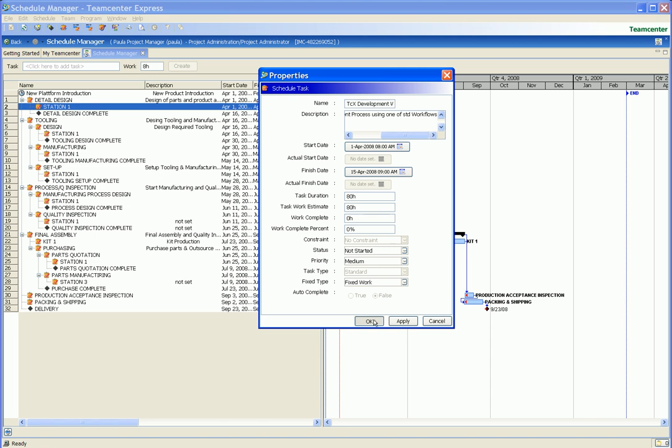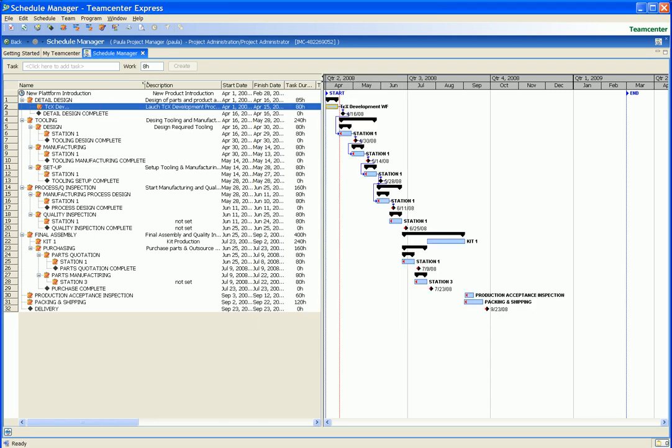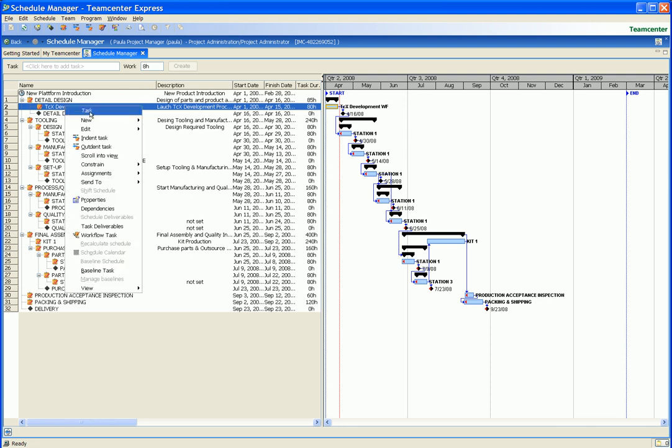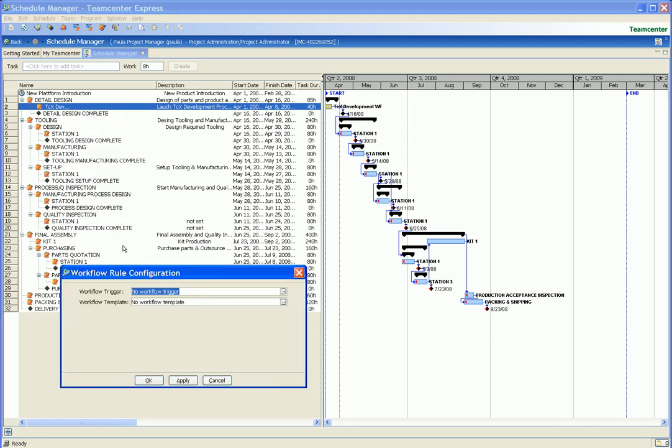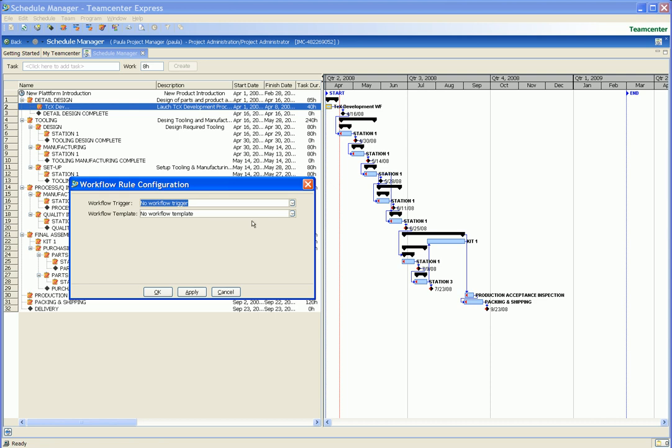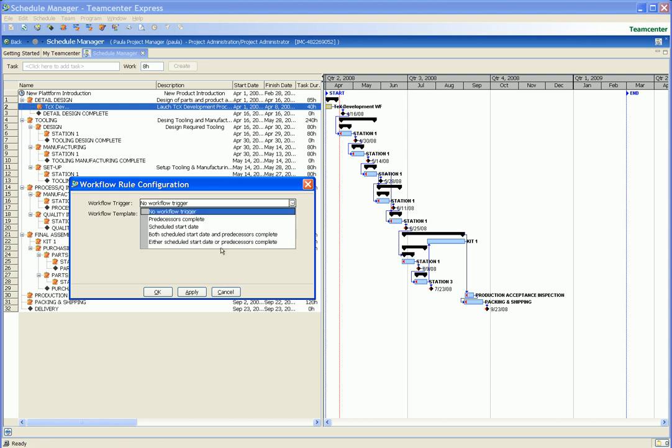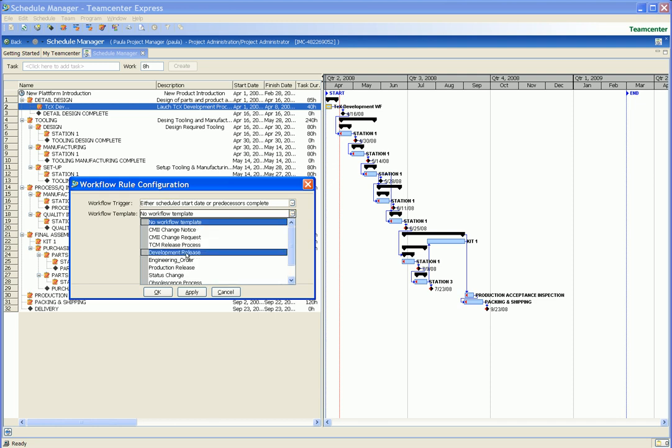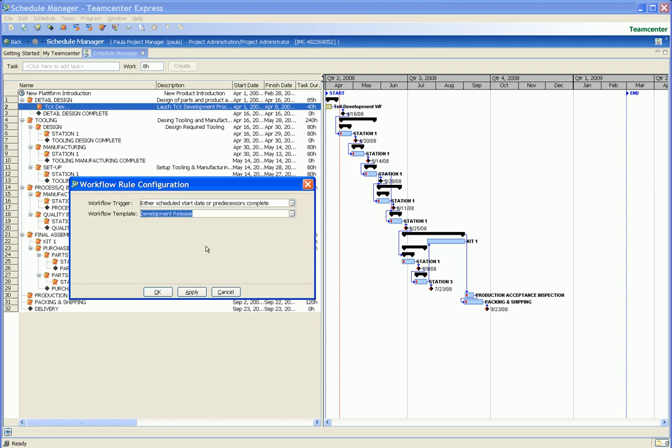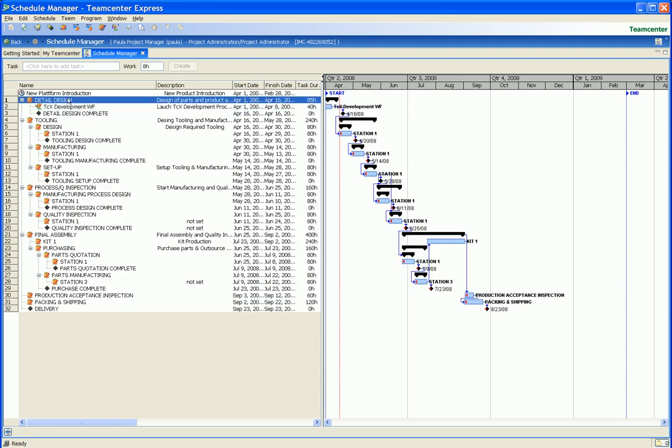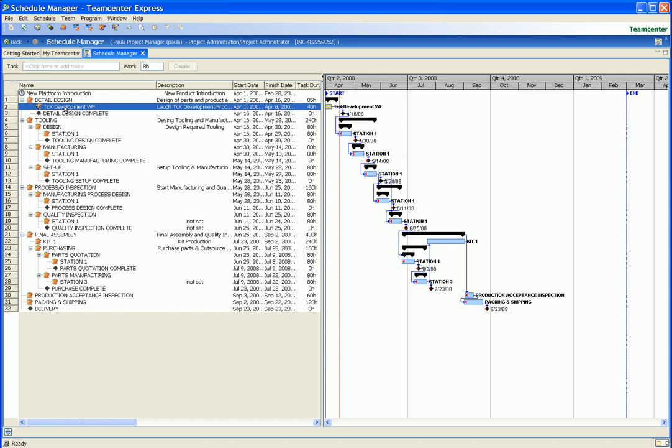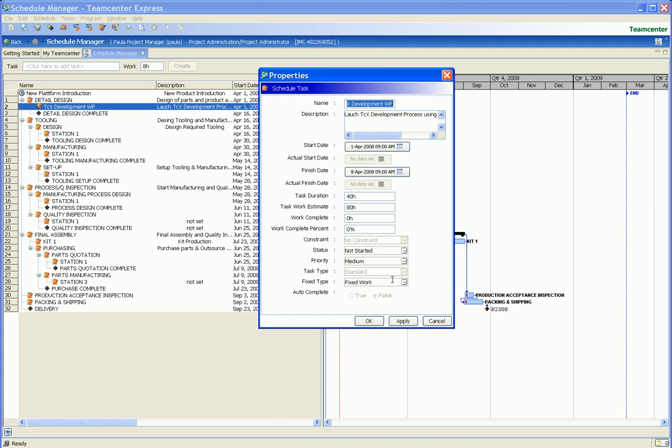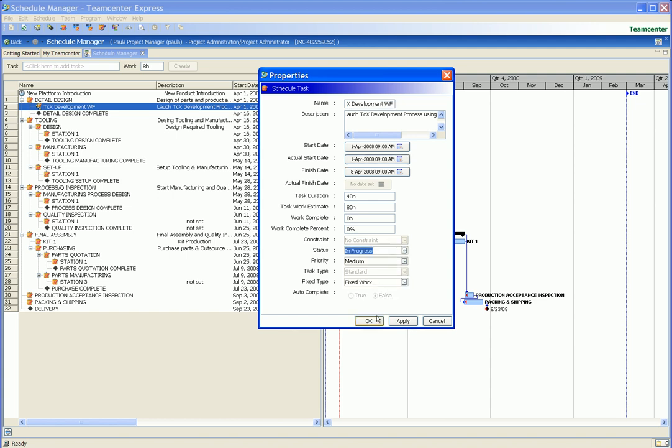We will now link a Teamcenter Express workflow to the selected scheduled task. In this example, we specify that the trigger for the workflow is either the scheduled start date or when the predecessor tasks are complete. But note that other options are available for this trigger. We also specify the type of Teamcenter Express workflow that will be triggered. In this case, we will trigger the pre-configured development release workflow. Note that the schedule task icon has changed to indicate that a workflow is now linked to this task.